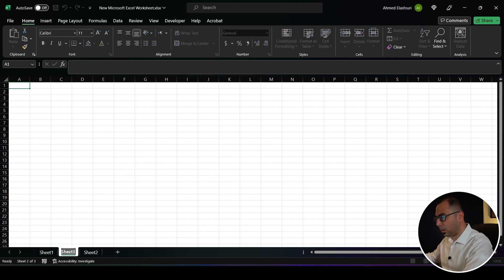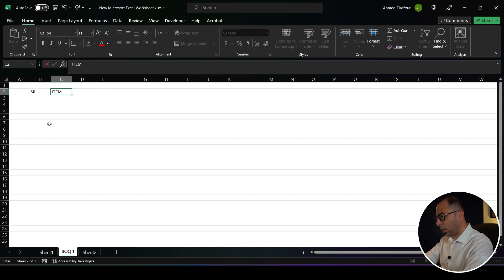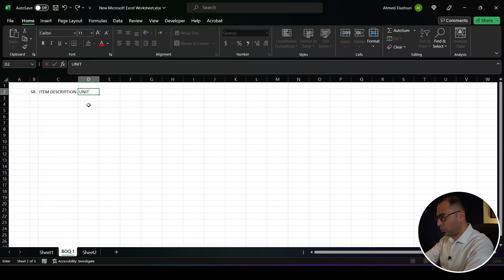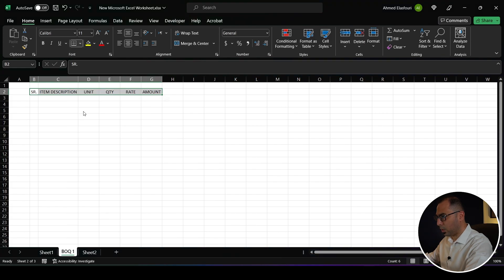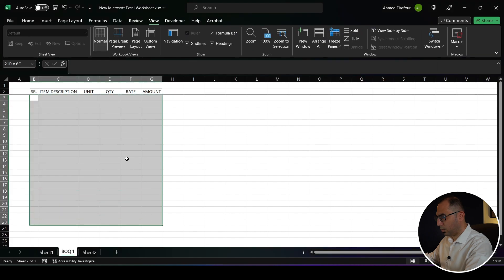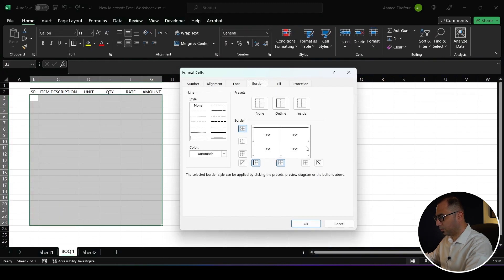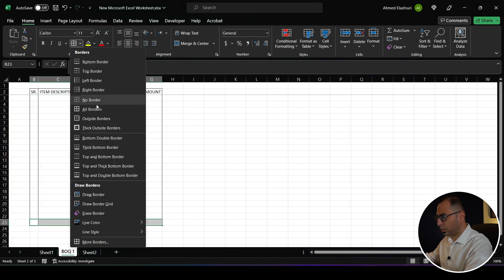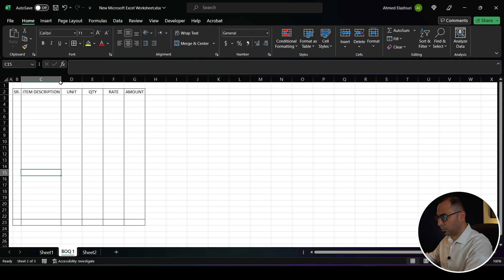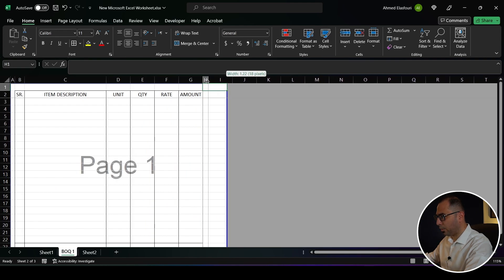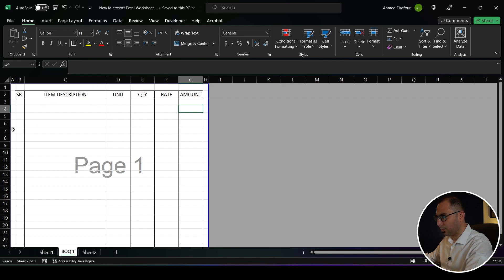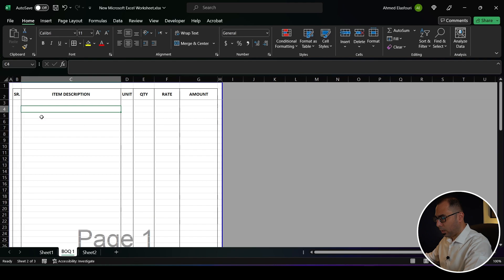The next step is to start creating a BOQ, so I'll make a new tab and call it BOQ 1. I'll create two BOQs — one in accordance with POMI, which I'll explain now, and one with just the concrete volumes. The columns are: serial number, item description, unit, quantity, rate, and amount. I'll do some quick formatting — everything centered, all borders, freeze this row, and adjust the column widths.